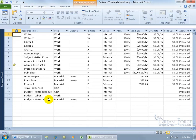The same goes for materials, except materials is going to be in units. If I have a total of five reams of glossy paper assigned to any one of my tasks, plus five reams of plain paper and one printer, the total units assigned for my materials is 11. Every time you assign one of the materials, it takes up a unit. So if you set aside ten units in your budget, then we're over by one.